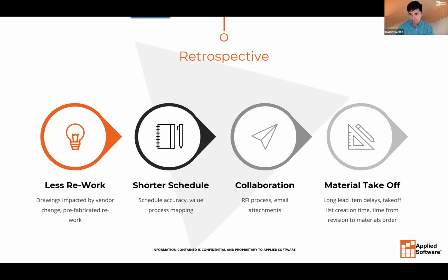So measuring your RFI process, and this gets a little bit deeper and into the weeds, but just looking at how many times people are asking for emails, because most of the time, if there's a transmittal and someone loses a drawing, how many times have we been in scenarios where someone was on the wrong revision? That's almost every time. We have to go through and make sure everyone has the right version of the file printed out. So we need to look at metrics for capturing that.